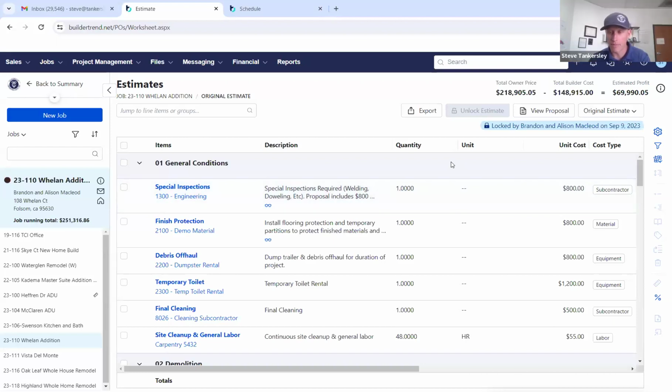Well, once we've got the budget established on the project, we do a lot of internal budgeting on the back end, and we know the scope of work. We'll release the bid packages once everything is designed. And what we're selling the clients is this process, and we're often selling, hey, we're going to get a couple of bids per trade, and we're really going to try to narrow this down. My trade partners know that. We'll do job walks, trade walkthroughs on these jobs. But we don't send out those invitations to bid until we have everything finalized, as far as design selections go and everything. And again, we don't just really bid work. Everything's through a pre-construction and negotiated agreement.